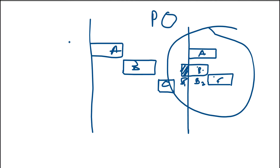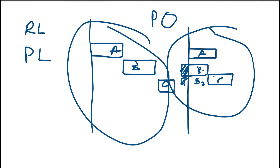If you ask yourself which one will have a longer duration on your project — retain logic or progress override — definitely retain logic, because it will still retain the original logic. Progress override will not retain that logic. But there'll be an issue, especially when you have the same resources working on activity A and activity B. It will show that you need the resource at the same time, so you might experience resource over-allocation when you plot your histogram.